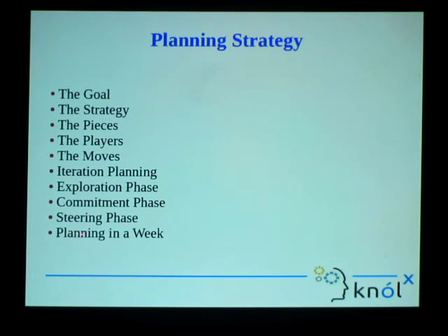Right. And the last is planning in a week. It means that we should plan for that particular week ahead, because in the starting we saw that ideally we should work only 40 hours a week. So we should plan for that whole week in the starting itself, that in this week these are the tasks that we should complete within those 40 hours of work. So these are the planning steps included in the eXtreme programming planning strategy.